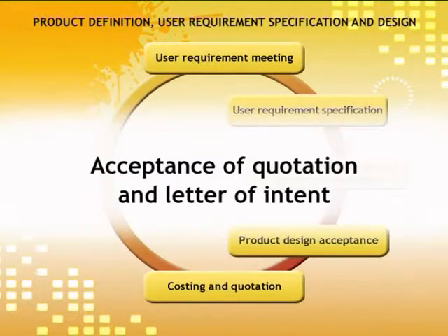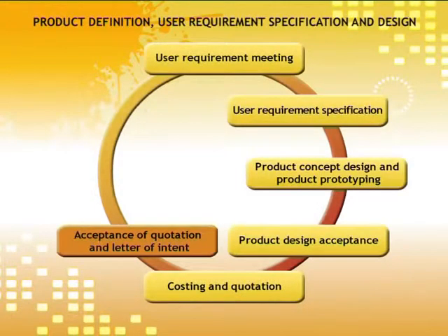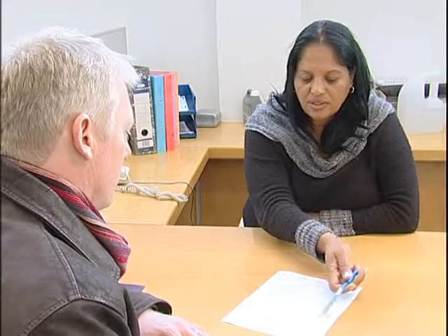Acceptance of quotation and letter of intent. Once the client has approved the cost estimate, a letter of intent is issued to the manufacturer to authorize the commencement of the project.